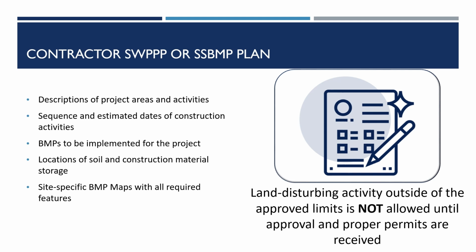If changes to the project BMPs or land disturbance is anticipated, revised documents, including updated SWIP or SSBMP plan, must be submitted to and approved by AREE. A more in-depth explanation of changes that trigger document revisions will be included in Part 2.